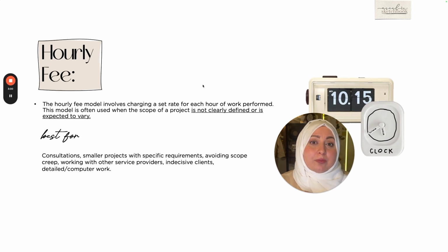Either they do it by charging the client invoices, several invoices. Each week completed in the project, they invoice the client and then they wait for the client to pay that invoice so they can continue the project. So this is a very important method to use. It's mostly used in the US and Europe. It's much more familiar. It's less used in the Middle East unless you are using the hourly fee to actually justify a flat fee, which we will be talking about later on. So this is how it works.